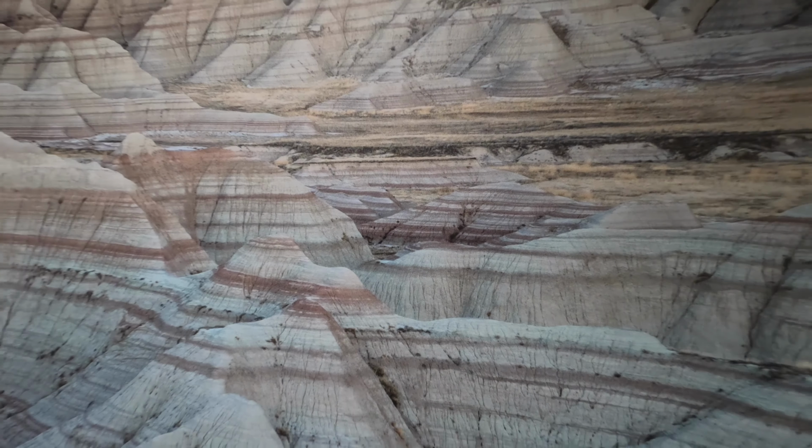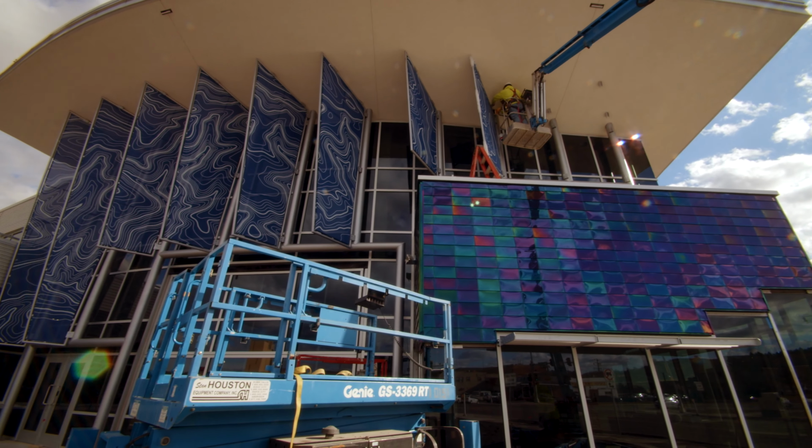We had some nice weather to the start of February. We were able to get outside. We got our sunshades up. Each one of them, as it hits the soffit, is a slightly different angle. They all fit like a glove, fortunately. It's still kind of a process in order to get them up because we have to lift this 250 to 300 pound sunshade 30 feet in the air while we drill a 1/2 inch hole through the steel until we can get a bolt in. Once the first bolt is in, then it's all gravy from there.